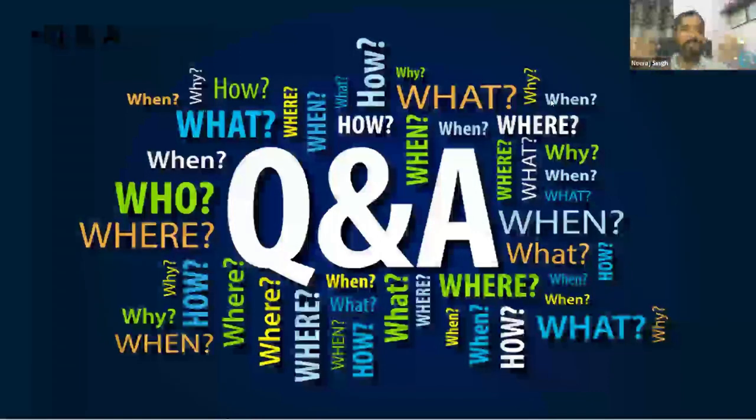So we need to discuss with the business what we want to freeze here. Then they will understand: I'm flexible on time, but the scope is frozen. That means this is what we want to implement, and however long it takes to implement that scope, please go ahead and do it. The other way around is that I've kept my time frozen, and within this time I can keep changing my scope, but this is the deadline. I have to achieve this and complete it.